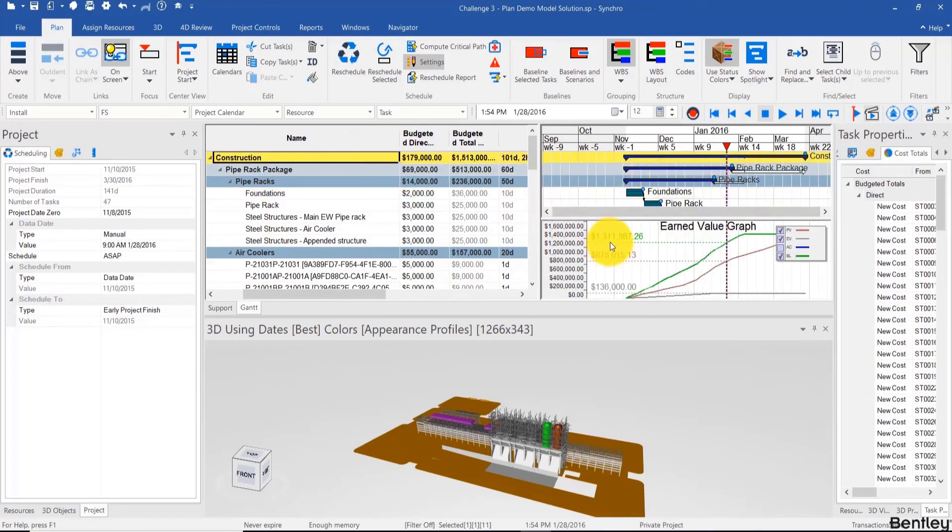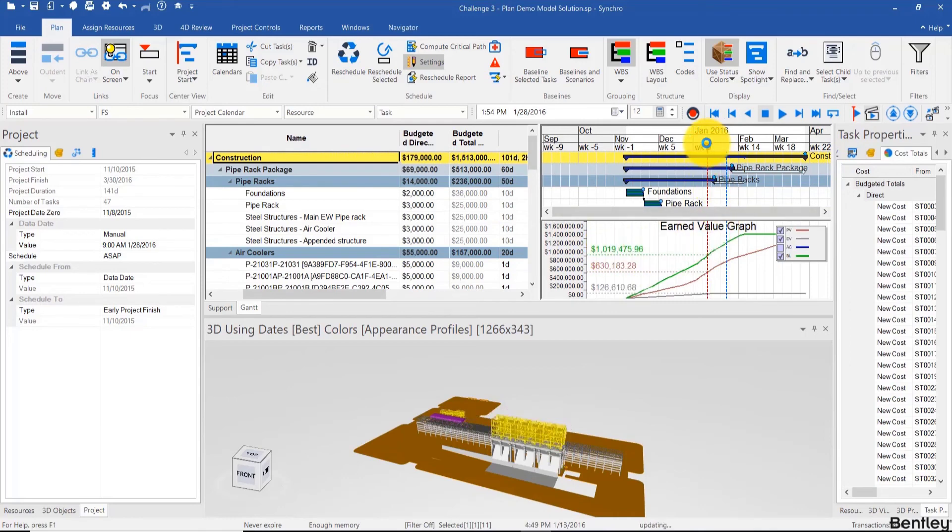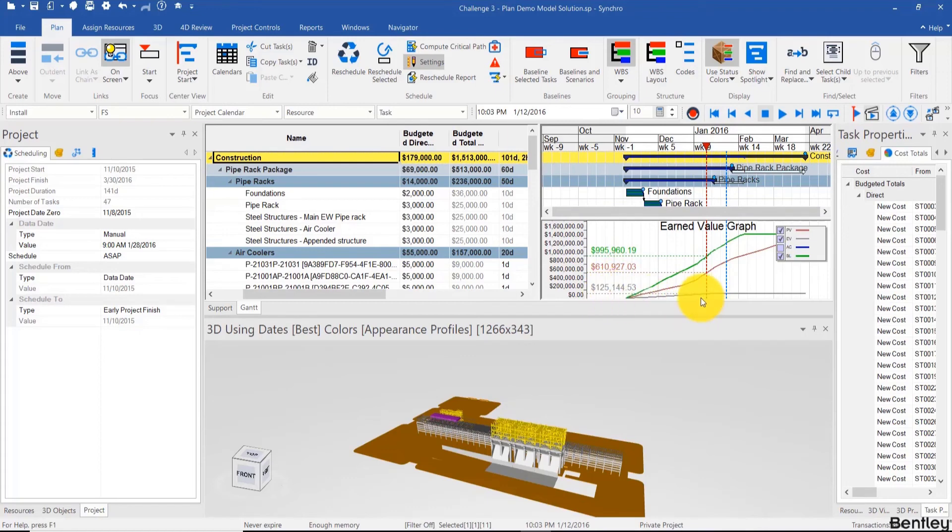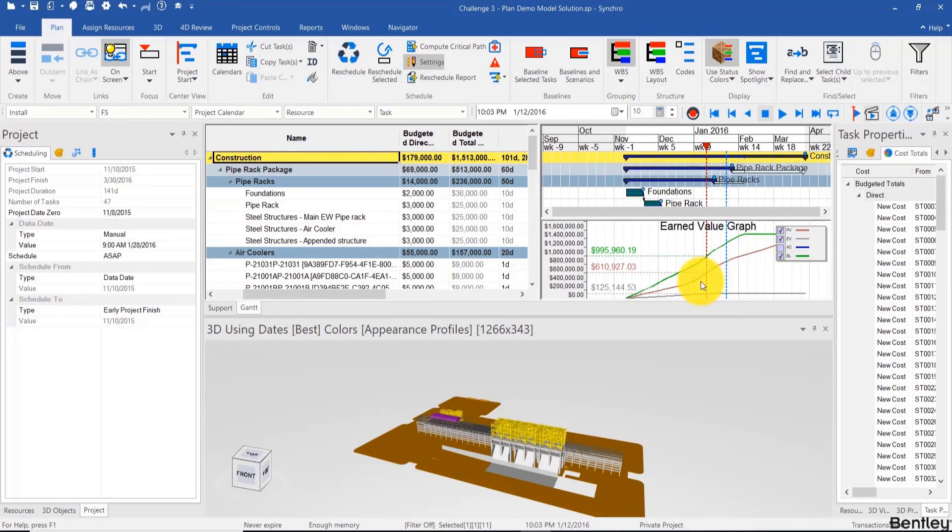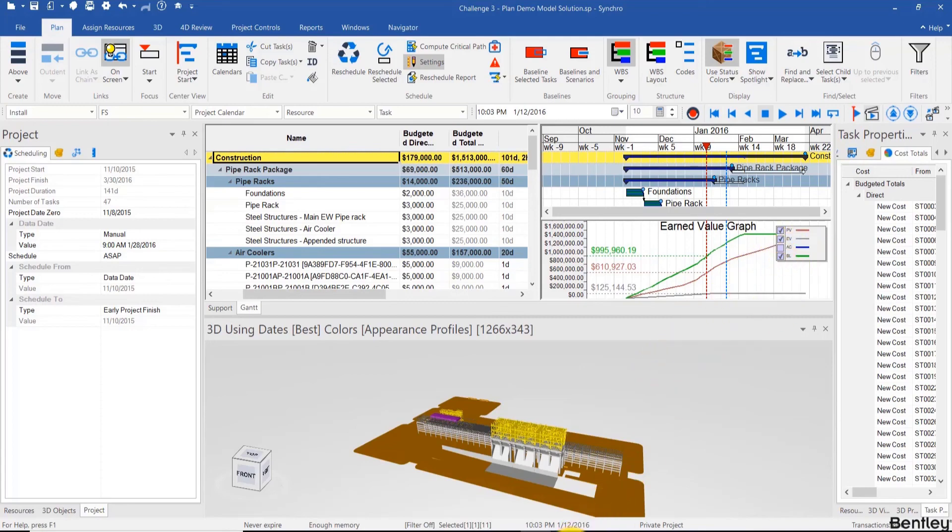Now if we look at the project as a whole, at this point in time, for example, the earned value according to what we status—we didn't status all the activities, but according to what we status—the earned value is less than the planned value, which means that we have completed less work than we had promised we would have completed, which means that the project is delayed. It doesn't mean that we're under budget. That's a completely different story that's related to actuals. It just means that the project is delayed. In the next video, we'll look more in depth into actuals and cost controls.